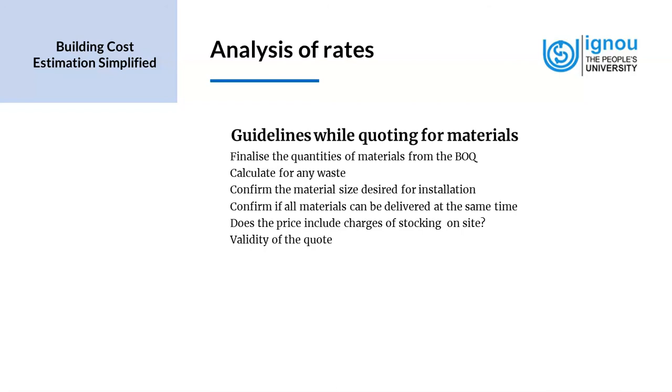Now, the validity of the quote. Suppose the quote for price of the material comes from a supplier. Does that quote have an expiration date? How long is it valid? This will help us to arrange the purchases within a particular stipulated time period.